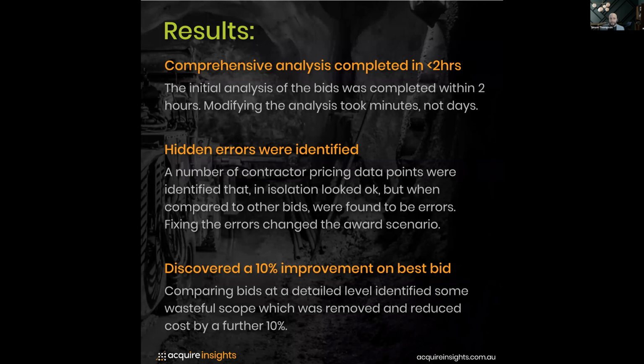So the results. The good thing was that a comprehensive analysis was completed in less than 2 hours. How we did that was, because the tender was out in the market, we could build up predefined analysis in advance. When the bid sheets came in, we literally loaded them into this tool, ran a few checks, and produced a report which showed us what all the errors were and what all the opportunities were. It literally took minutes, not days. That was a massive time saver.